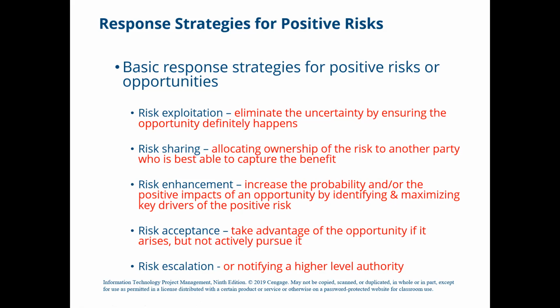Last is risk escalation, which means to notify a higher level authority. So in the context of our example, we can analyze it. The computer classroom project manager might escalate the risk of partnering with another firm to a higher level manager who may have more influence with the firm, and who can take care of all that. So these are some of the strategies to deal with positive risks.